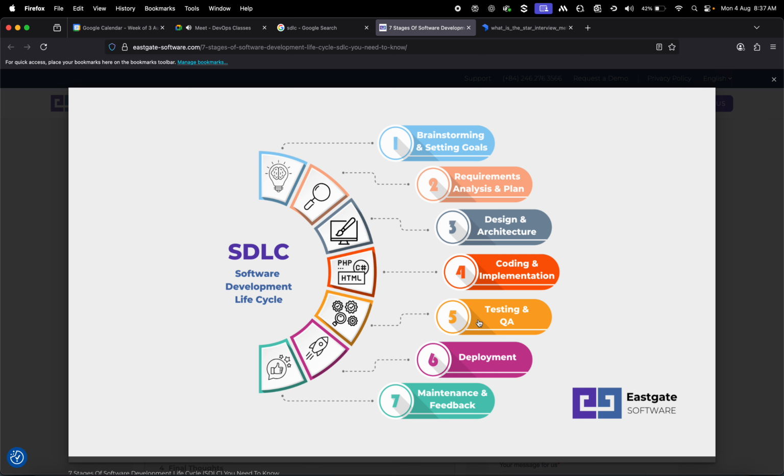Next, cart page maybe. So like that, they divided the application into smaller parts to make the development cycle smaller. As I told you, earlier, with the waterfall approach, it was 1 year. Now it still takes 1 year to write the code, but in smaller parts, smaller cycles. Earlier, they would write the code for 1 year, everything, login, cart, everything, and release it at one time. But now they're releasing one feature at a time. This became easier.